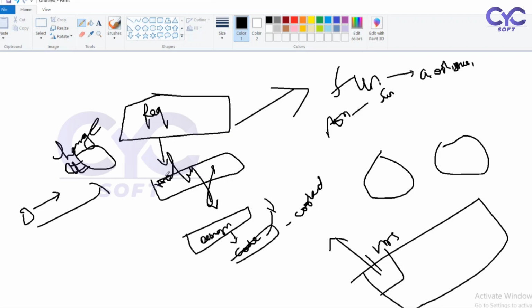If whatever we did is not as per the SRS document, then the company is responsible to fix it for free, and they have to take care of this maintenance for the period of the agreement. If they have an agreement for 2 years, they have to take care. If anything happens, they have to correct it in time.